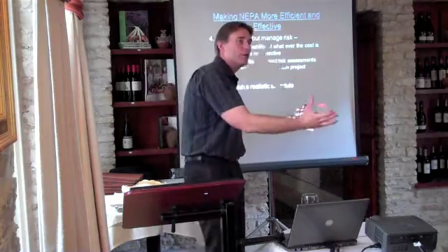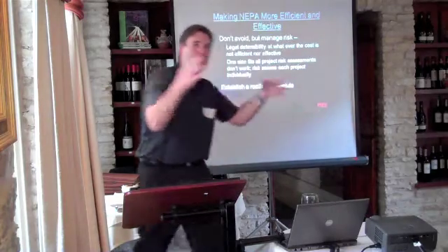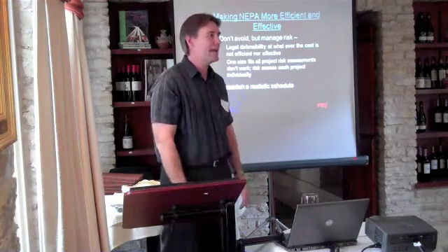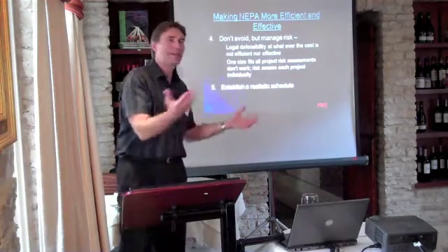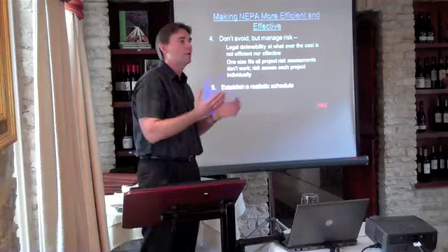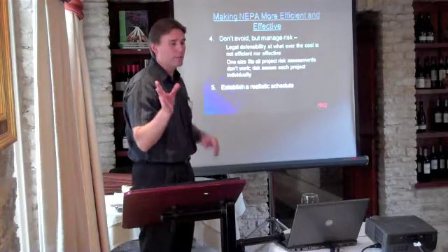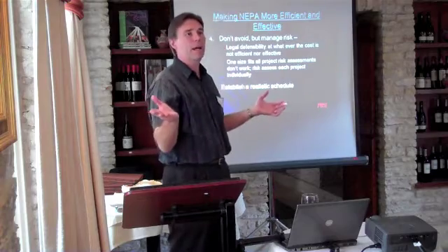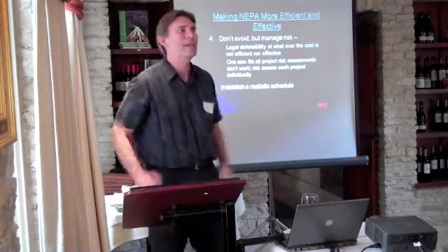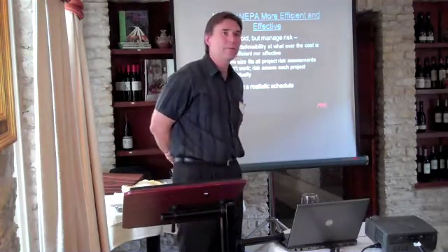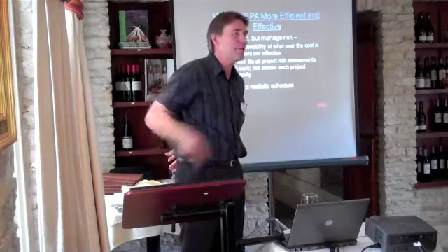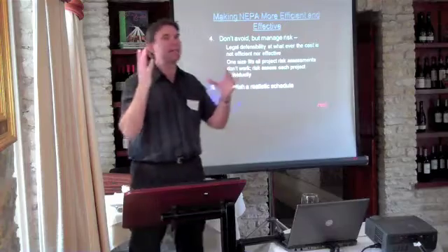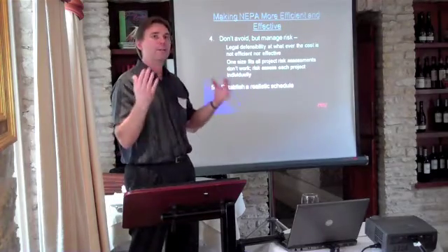Then you know your big issues. You know your risks. How else would you come up with a realistic schedule? So many schedules don't account for the risk, and so there are a lot of unrealistic schedules out there for whatever reason, and because there are so many unrealistic schedules out there, guess what? They think your project's being delayed because you're not meeting that unrealistic schedule. That's the mindset about delay.